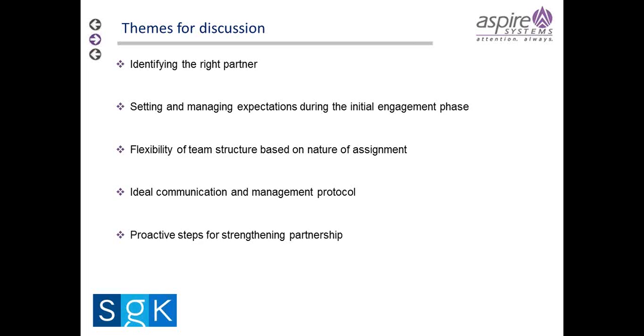So again, kind of going back to that, once you have a project that you start working on, I think we're going to get into more details of project by project, developing the relationships, defining structural arrangement. A master service agreement is a helpful document, an overarching document which says exactly how you're going to operate together, and then the service level agreement to set your expectations. When I say I need help, how quickly is this vendor going to respond? And then I need to track against that. Did they, in fact, respond as fast as they said they would?